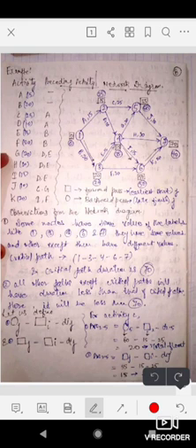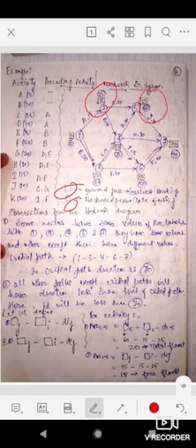Okay, now let us consider here. I have shown a square and a circle here, here, and here. So what are these two things representing? The square represents the forward pass, when we move from the starting point to the finishing node, and the time written in the square represents the forward pass.